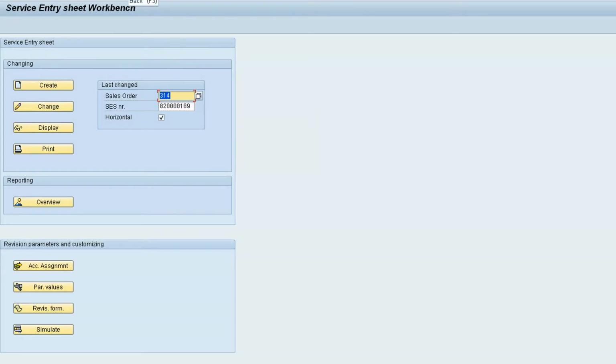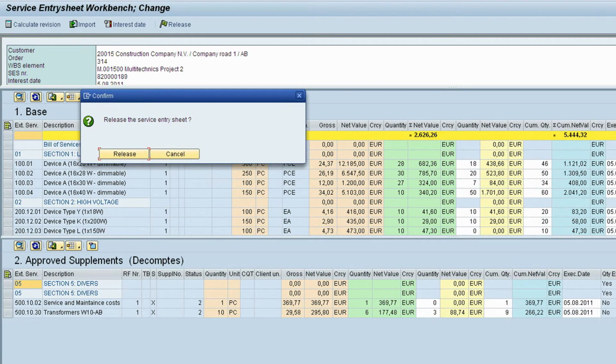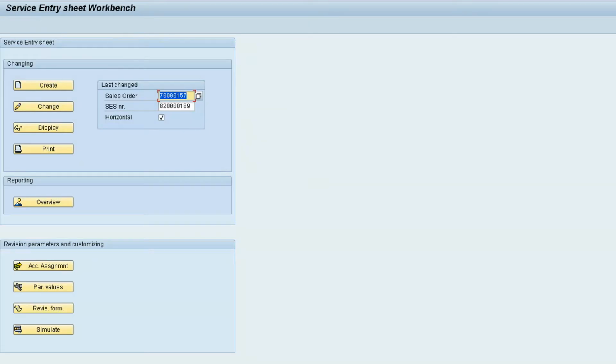The Prefab SAP Sales Manager's Workbench is an integrated solution for organizations working on a project basis, where the periodical billing occurs based on the progress of a project. The Prefab SAP Sales Manager's Workbench is fully integrated with other Prefab components such as the Prefab SAP Project Manager's Workbench. The expected revenue from the Sales Manager's Workbench will be shown in the Project Manager's Workbench. There is also integration with the standard SAP billing feature to create invoice documents and financial reservations.